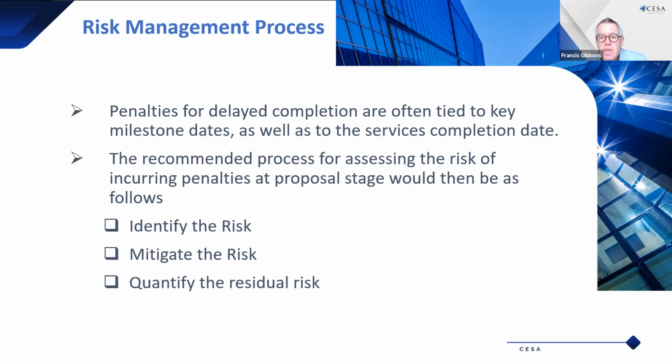So the second step then is to mitigate the risk. We've identified that there's a risk of delay because the contract is awarded 9 months, a year later than we expected, and everyone's now busy. And so how can you mitigate that risk? So the obvious thing is to increase the float in the program by allocating additional resourcing. You can also mitigate some of the risk by transferring the risk to sub-consultants who are on the critical path and make them responsible for penalty if they are the cause of the delay. That's also fraught with all kinds of disputes. But importantly, you want to make sure you've got the resources and you've got the float.